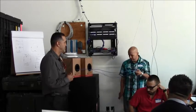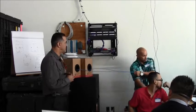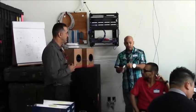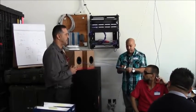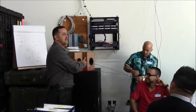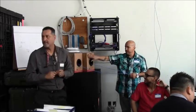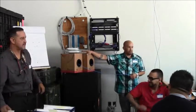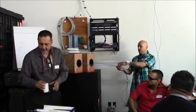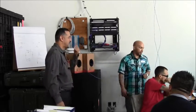So basically, you'll have your endpoint right here. Once you get your endpoint, if there are multiple cables, like 10 cables, I like to tape it up, because now I'm labeling my MDF side. Now you have to label it again. If you don't do this, you'll probably be fired. That's why you write the identification of the cables on the box, like 1A, 1B. Same process. I'll usually do it 3 times, and that's it. Then I'll cut it off, and there you go.